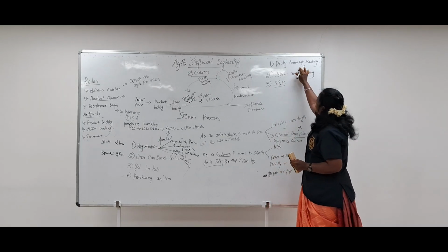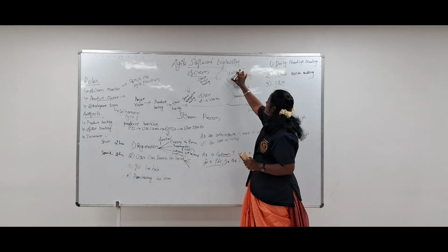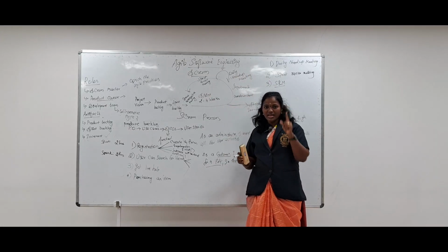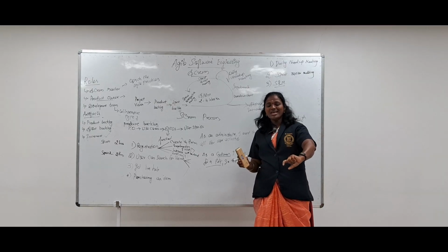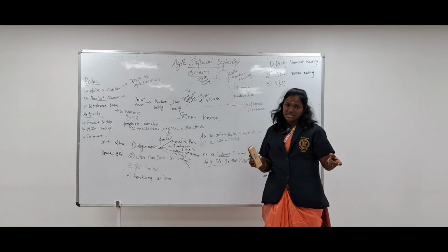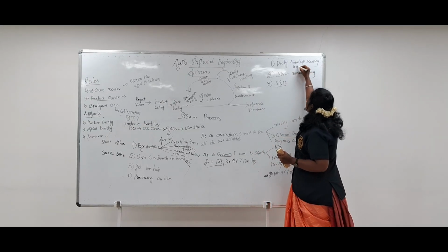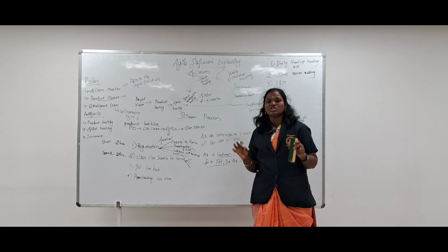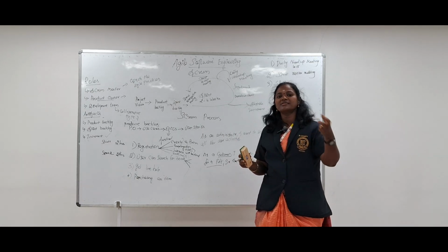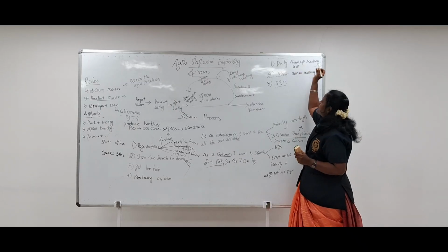So these are the 3 different meetings in the sprint process. The sprint daily meeting means that on a daily basis, in the morning or at the end of the day, they have to conduct a meeting for a maximum of 15 minutes. What has to be done for today, what we planned, and whether it is executed or not, we have to analyze in the daily stand-up meeting.